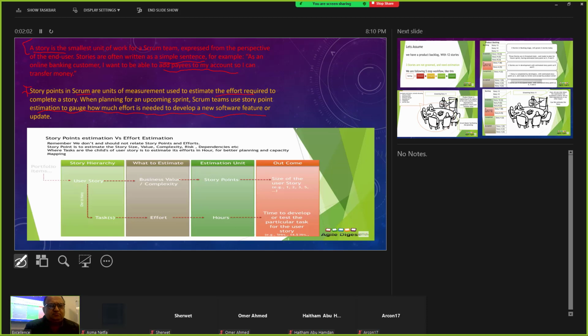While doing the poker planning, while we are discussing story points, there are two things here. There are user stories and there are tasks. When you are doing tasks, you generally don't use this poker planning, because it is usually defined in terms of hours. You have to quantify the task: how much time it will need, how much cost it will need.